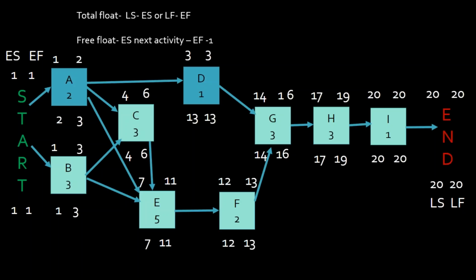Yes, Joe. My only question is, I forgot what this kind of diagram is called again. A precedence diagram. This is actually a network diagram now that I have durations on it. It started as a precedence diagram, and this is now more of a network diagram, more like you would see in MS Project. If you clicked on network diagram, you would see this big spider web. You wouldn't see that in a Gantt chart. You'd see this big spider web and it would identify the critical path. It would all be a nice big line of red tasks, from end to end.